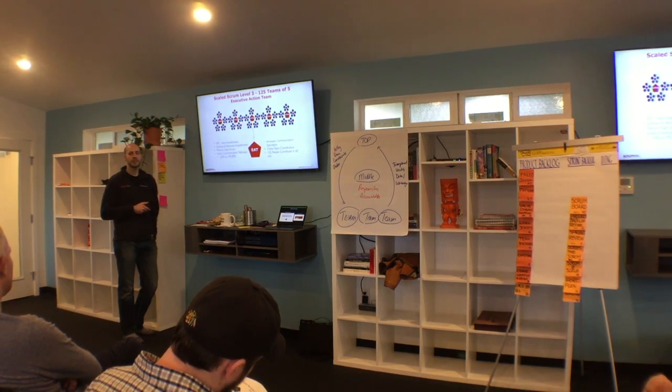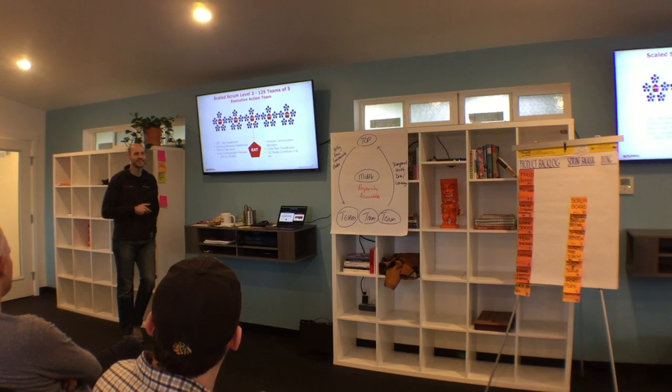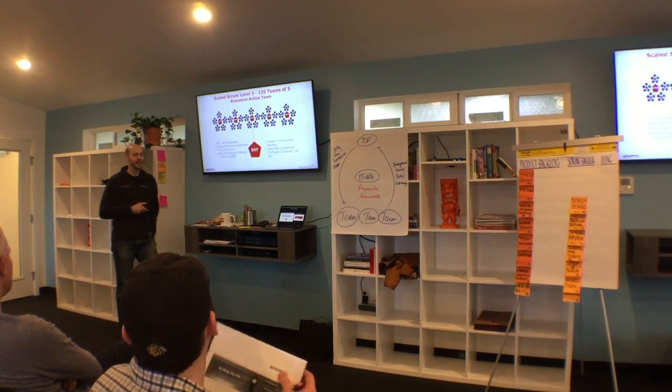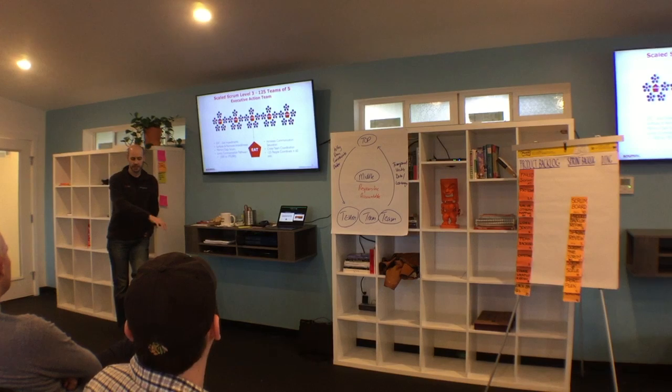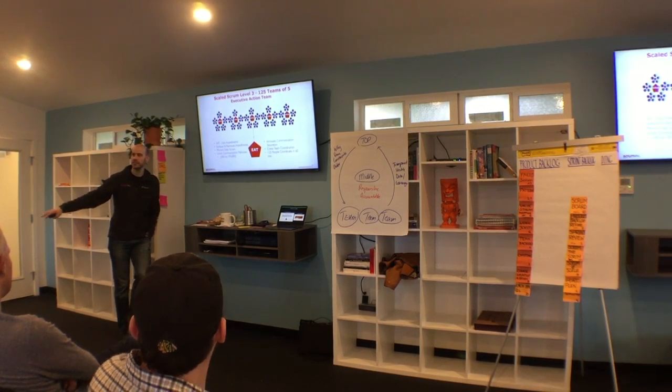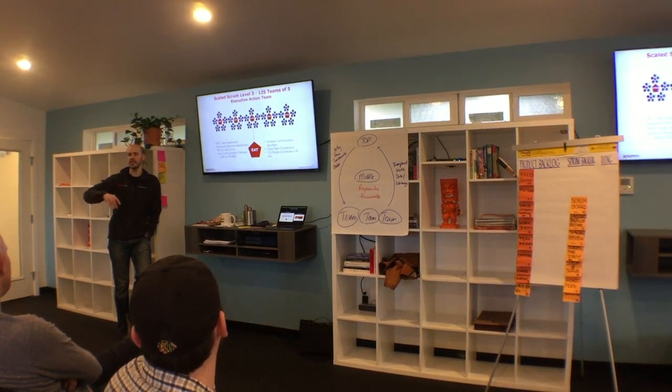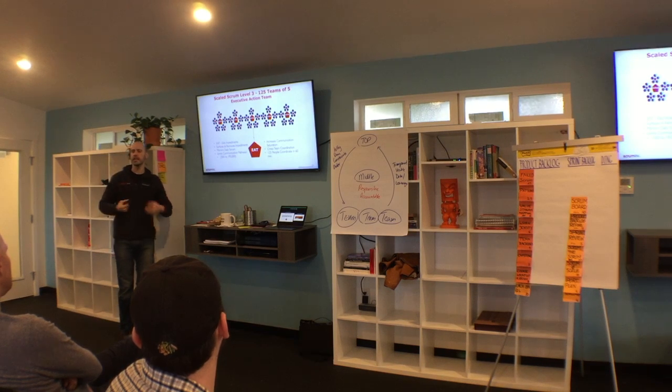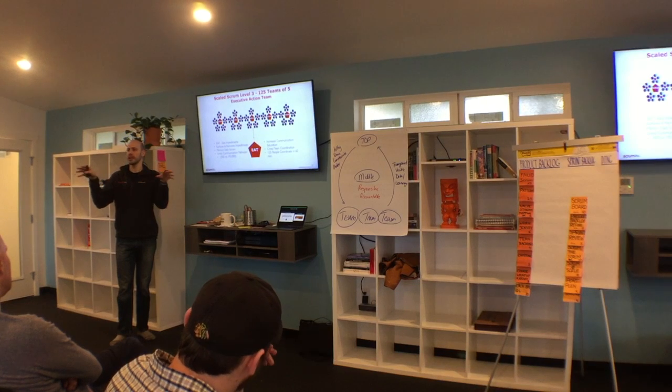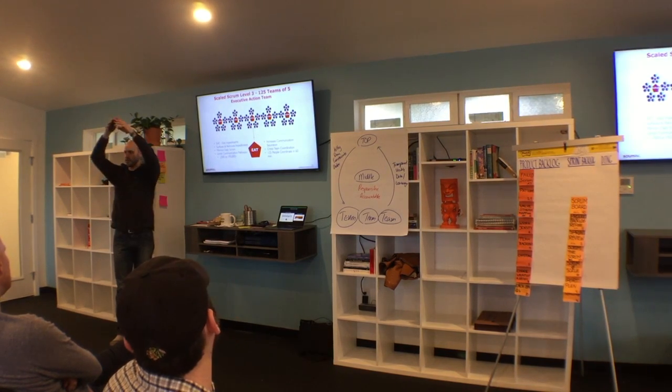After their scrum of scrums, the last 5 Scrum Masters, just one out of each 5. So these are Scrum Masters just from any 5 teams, and they can rotate who it is each day. It's not a senior position or anything like that. It's whose team had a burning impediment that wasn't able to be solved at an earlier Scrum of Scrums. That's who goes on, right?